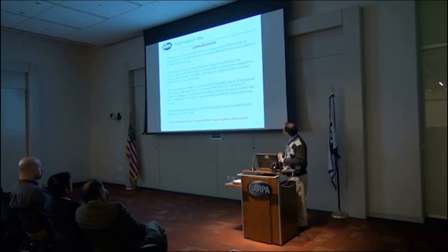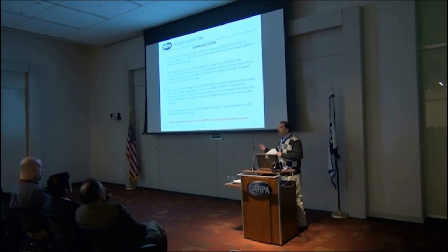So when the proposals come in, we have what we call a clarification process. At that point, the communications will be basically us going back to you if we don't necessarily understand a concept that's being discussed. If we see a conflict between cost and technical, we'll go back and ask clarifying questions. The one ground rule there is that we can't ask you anything where the only way you can respond is by changing your proposal. You cannot change your proposal during that process. That would actually be negotiations. We typically do not do those in the BAA process.